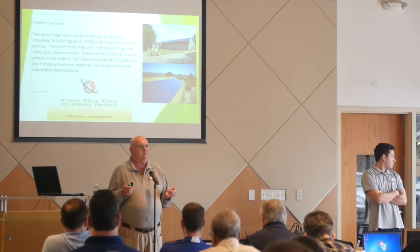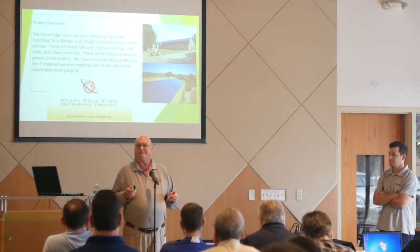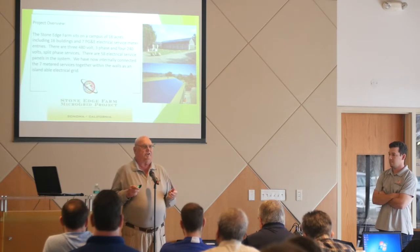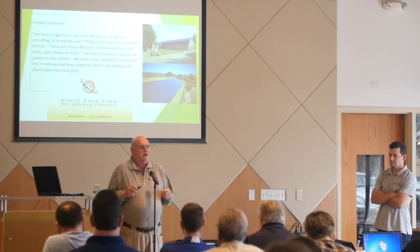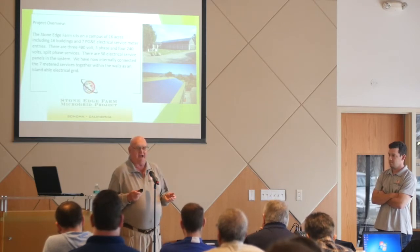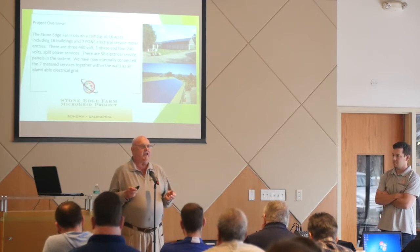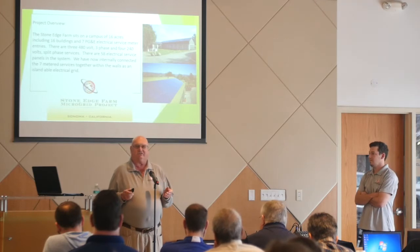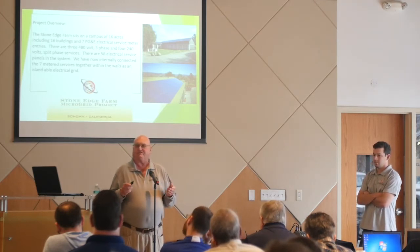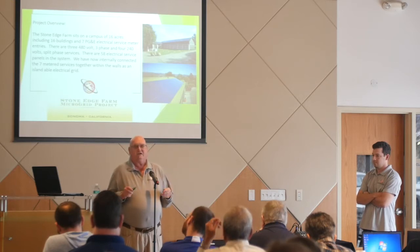Right about the time we submitted to Pacific Gas and Electric for a connection agreement, we also started to look at hydrogen as our bulk storage medium, gaseous hydrogen. We got a very polite letter back from our utility company telling us that there was no way under the current Rule 21 in California for a microgrid to connect to the grid.